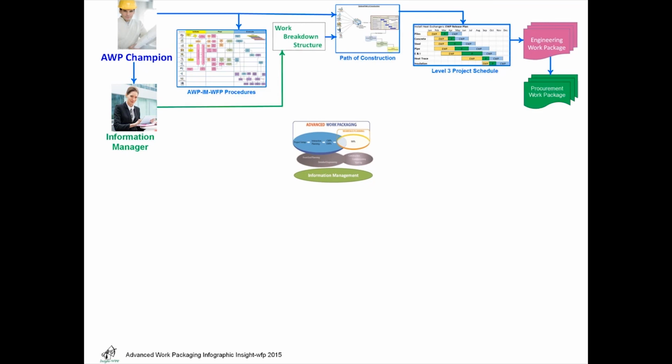The bill of materials from engineering work packages is then used to develop fabrication and procurement packages, which in turn ensure that materials are fabricated and procured as complete packages in the correct sequence. The creation and delivery of complete packages from engineering and procurement leads to the population of construction work packages, with all of the drawings and materials required to execute the work.